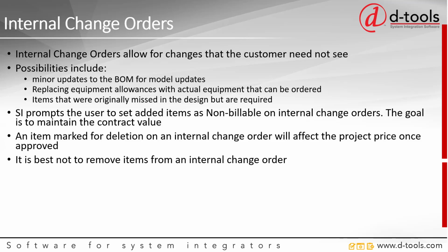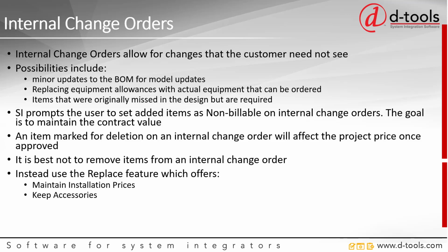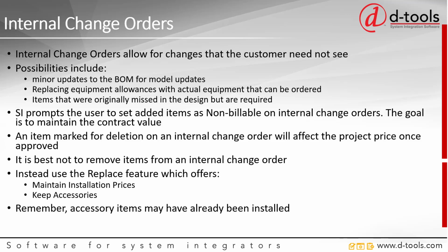It is best not to remove or delete items from an internal change order. Instead, use the replace feature. This offers the ability to maintain installation prices and also keep accessories of the previous item. Remember, accessory items may have already been installed, so we want to be careful about manipulating our change orders.